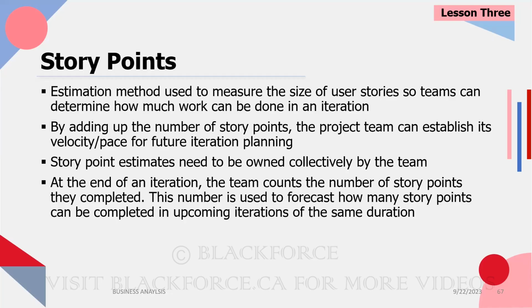And then in the next sprint, let's say in sprint 2, we pulled 5 and we delivered on all 5. And then in the next sprint, we pulled another 5, but we got through just 4. And then in sprint 3, we pulled another 5, right? And we delivered on just 4. The reality is our velocity, which is really the speed at which we're moving, is more likely 4 than 5.